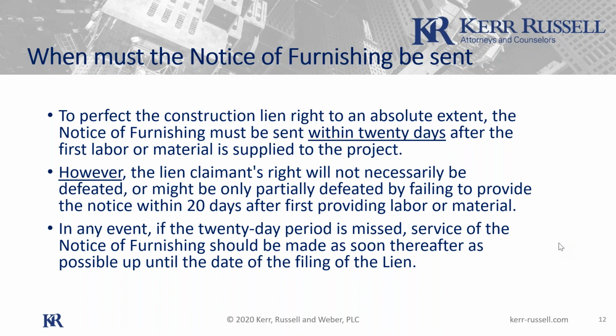So that's the second piece, that if you were operating perfectly in this lien world, you'd have people trained at the company to, as we discussed, send out that request for the notice of commencement by certified, and then following up on the information provided, sending out the notice of furnishing within the first 20 days, or at least within the first 20 days after having received back the notice of commencement. Both by certified mail, by the way. So that would be the perfect scenario if you had your staff trained to be able to do that. That would protect you the most.